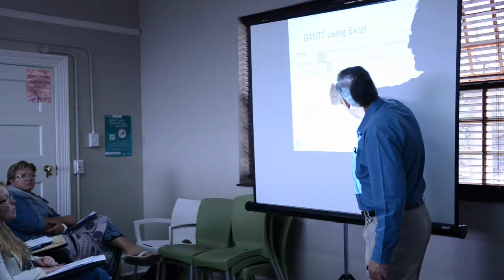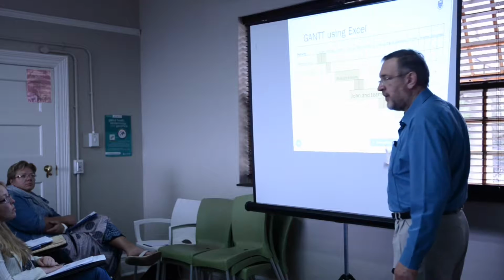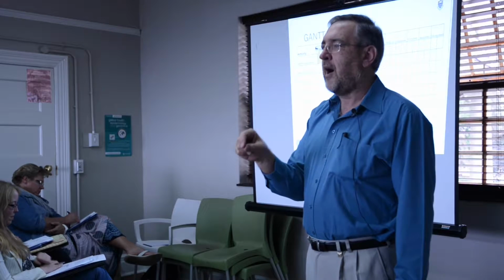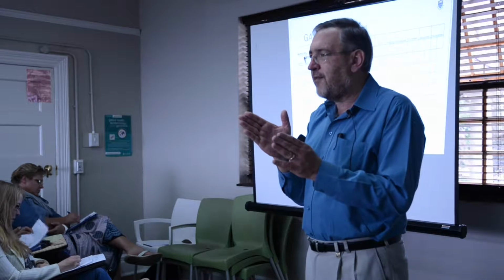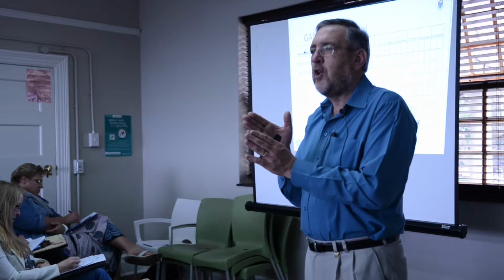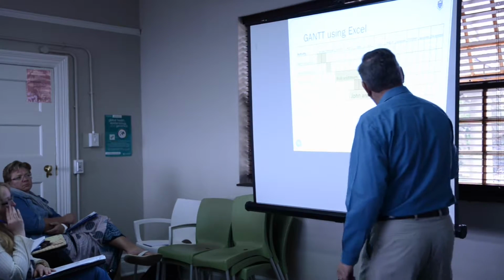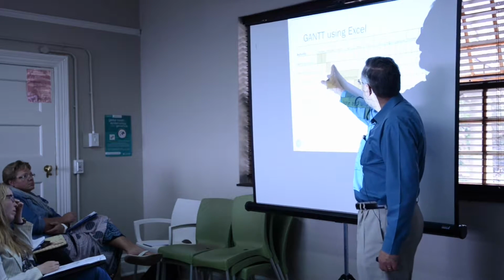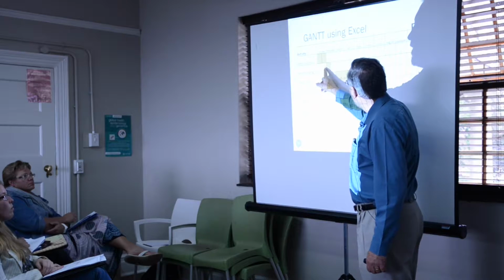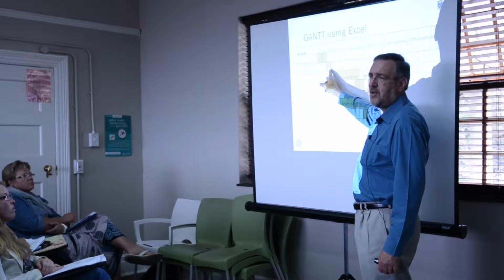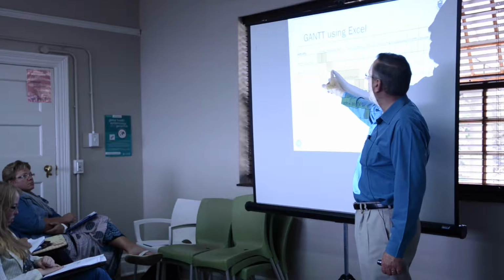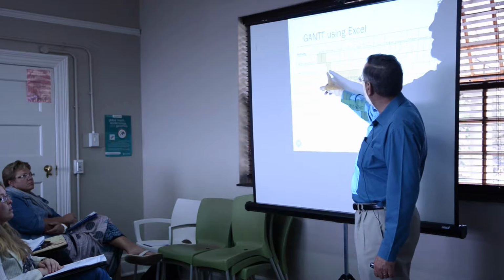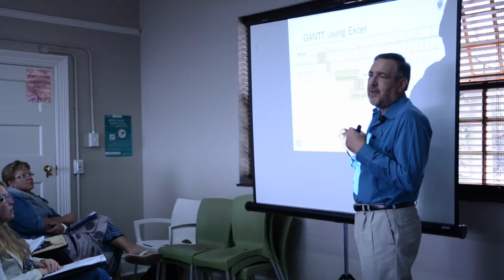Have you noticed there's nothing there and there's nothing there? That's not because I'm on holiday. It's called a time buffer. I put in a time buffer so that if something goes wrong, I can use up a bit of extra time without moving out my final deliverable over here. So I put it in after things that I'm not sure. I've set aside half of February for that activity, but I really don't know. So I put in a bit of buffer. So if something goes wrong at a high risk thing, I've got some time to absorb that problem.